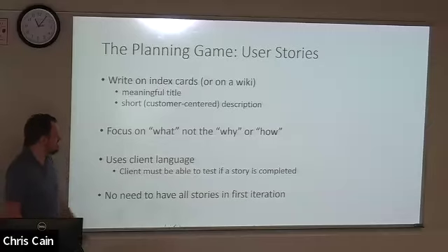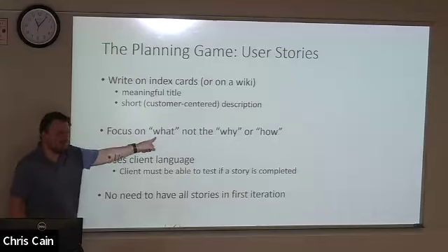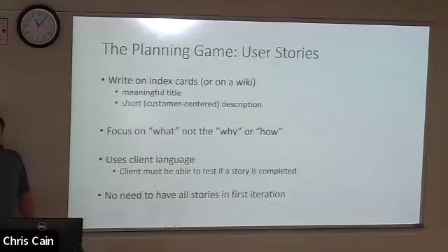And the rest of it is some kind of customer-centered or client-centered description of some requirement or need of what your application is going to do, something that needs to be accomplished in this sprint. This is no place for anything technical. You focus on what does this need to do, not why does it need to be done, or how are we going to accomplish it.